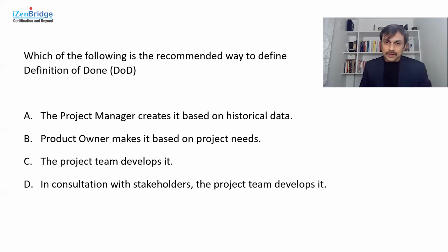Product owner makes it based on the project need. Now, this seems to be another candidate option, or I would say a trap option. So there is a clear understanding that definition of done is a team's job, a collaborative job, rather than a product owner's job or the job of someone who is representing the requirements. Someone who represents the business or the requirement can tell about a user story or can tell about the requirement and definitely works significantly more than other team members to discover the acceptance criteria for that user story or requirement.